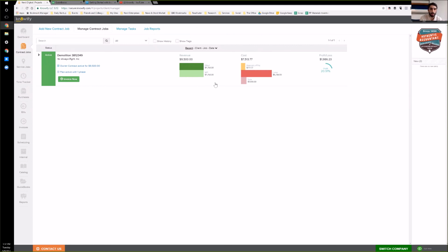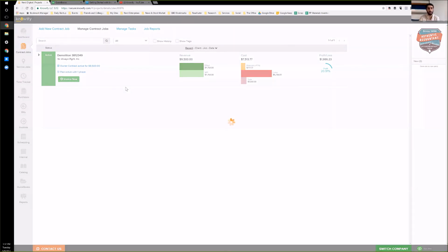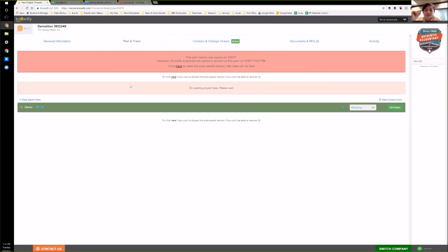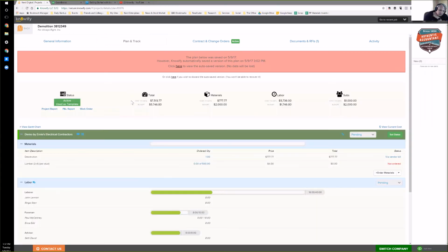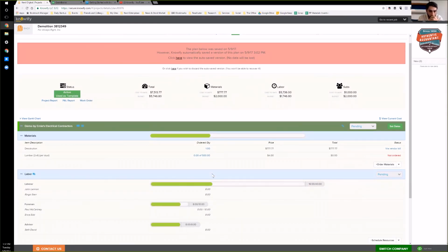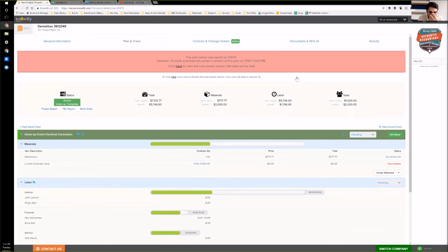We invoiced 50%. Right. And so I can actually come into this project, and I bet it's going to say you are way over labor budget. It'll show the totals on the top. This is what happens when I fiddle around too much. It's certainly the system getting confused as a result of my Mac, but this is showing me a little bit more about how I'm doing versus my budget and each different type of worker. I can see the cost versus budget, and I'm $4,000 higher on my labor budget than I expected. That's clearly where the issue lies.